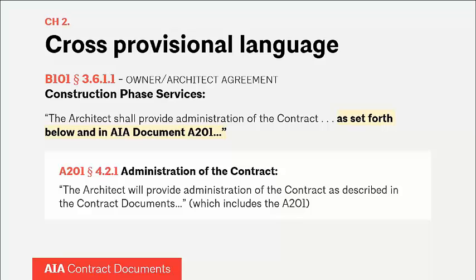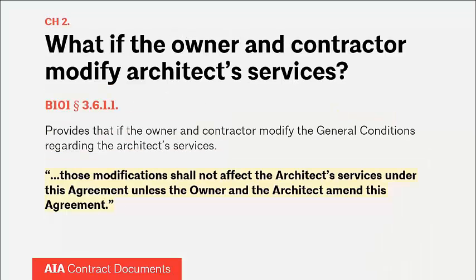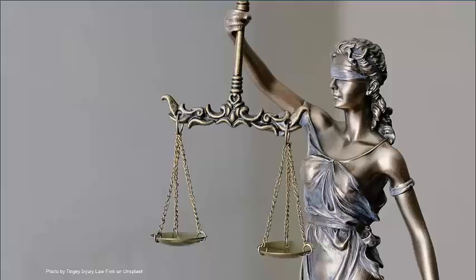But what happens if the owner and the contractor decide on their own to modify the architect's responsibilities in the A-201? According to the owner-architect agreement, no modification will affect the architect's services unless the owner also changes its agreement with the architect. This is also why, if the owner isn't using the A-201 as the project's general conditions, it's very important to read and reconcile the architect's services between the owner-architect agreement and the alternate construction conditions being used.